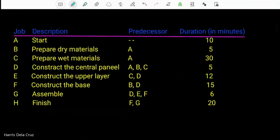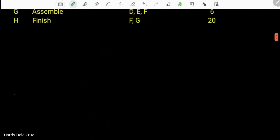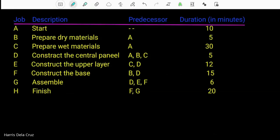The first thing we need to do is convert the schedule into a graph with vertices for jobs A to H, where arrows signify the dependencies or predecessors of each job. We start with job A at the leftmost and finish with job H at the rightmost. In between we need to place jobs B, C, D, E, F, and G in a way that visualizes the flow of the project. The next step is to plot vertices B, C, and D, since all of them are dependent on A.